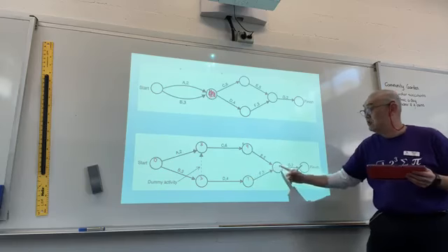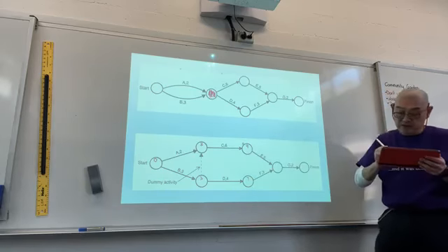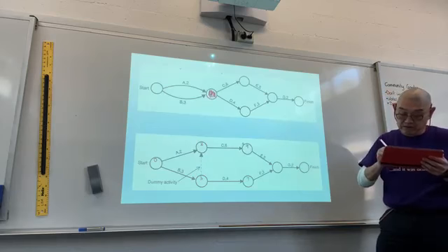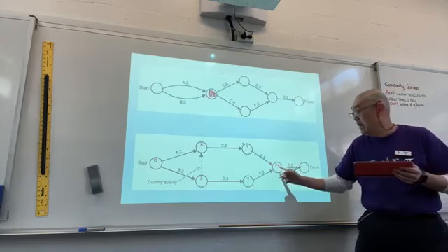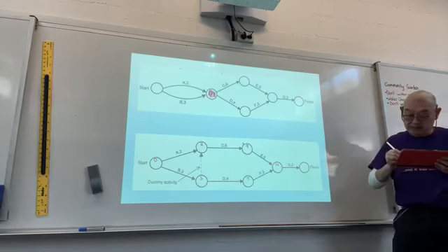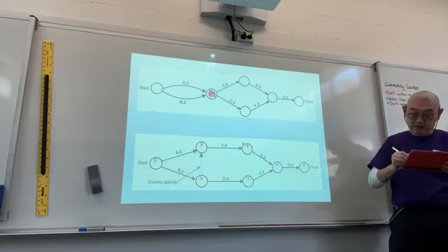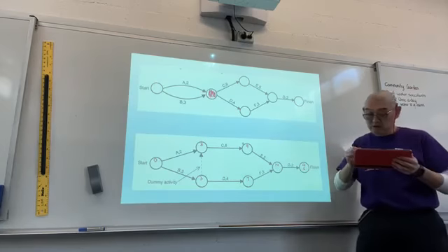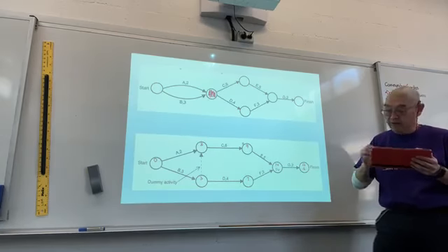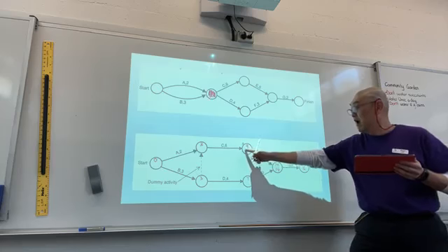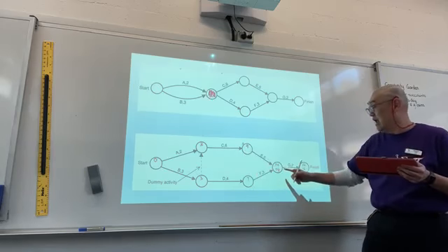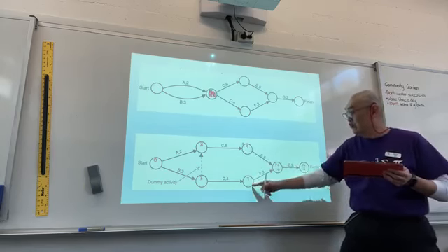Here 7 plus 3 is 10, 9 plus 5 is 14, so that's 14, oops, 14. And then there to there is 16. Alright, so let's move backwards, 16. 16 minus 2, that's 14. Now 14 minus 5 is 9. 14 minus 3 is 11.